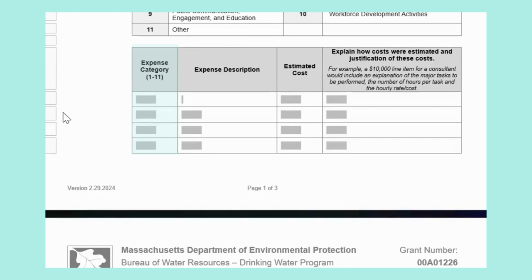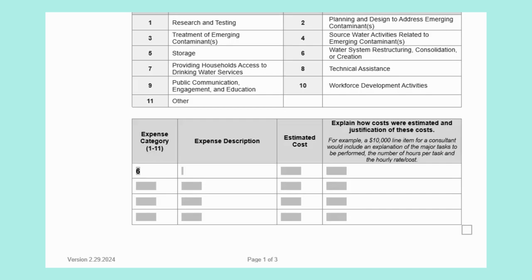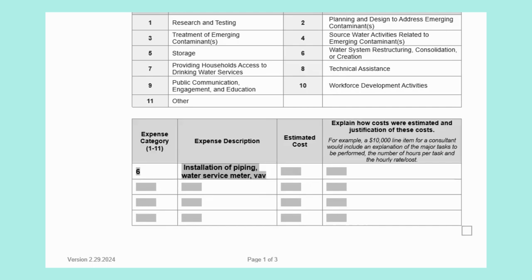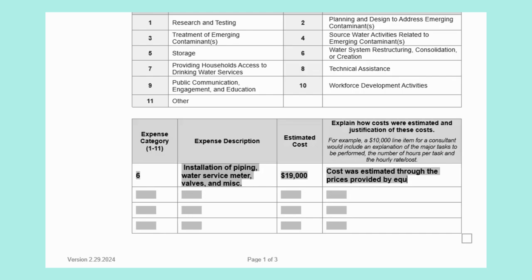In the first column, include the category number. In the second column, include a description of the expense. In the third column, provide the estimated cost. Your fourth column must explain how costs were estimated and provide justification, including descriptions of major tasks, hours of work per task, hourly rates, and cost of equipment. For our example, we will add work for Category 6, PWS Consolidation. The description is installation of piping, water service meters, valves, and miscellaneous. The estimated cost is $19,000, estimated through equipment manufacturer prices, estimated hours to install the water main, and hourly rates of staff.